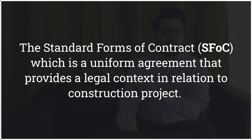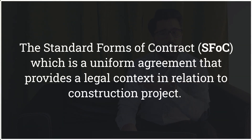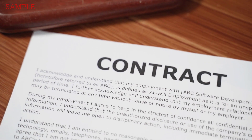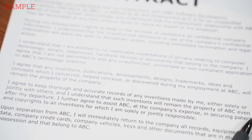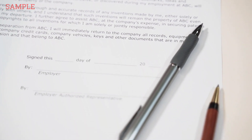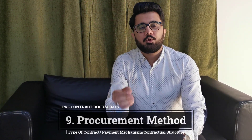What if during a construction project the client comes up with new requirements and the contractor denies, saying it's out of scope? Or imagine a contractor is not taking responsibility for tasks they should have completed long ago. That's why it is very important to sign a standard form of contract — a uniform agreement that provides a legal context in relation to the construction project. In this contract, everything is predetermined by authorized professionals, client representatives, and other parties. Commonly used contracts include FIDIC, GCC, GCT, and the New Engineering Contract.